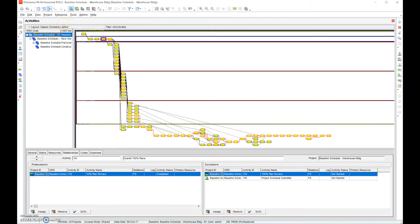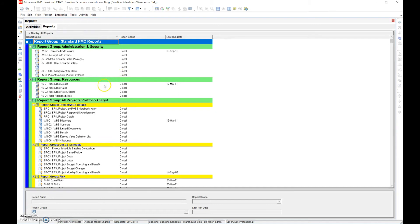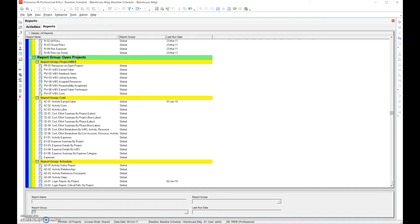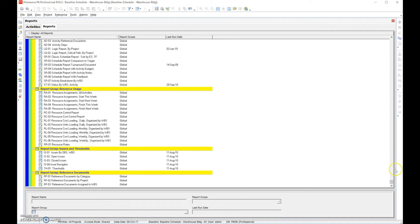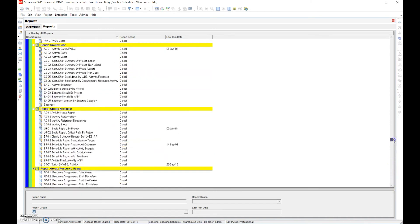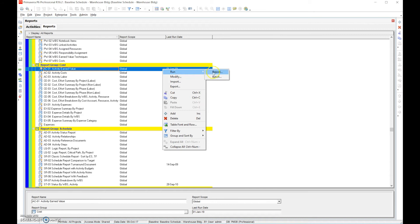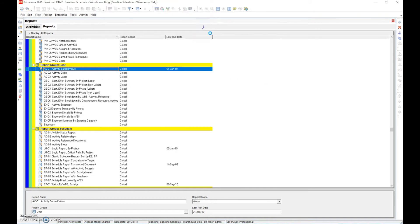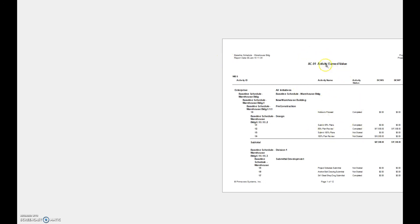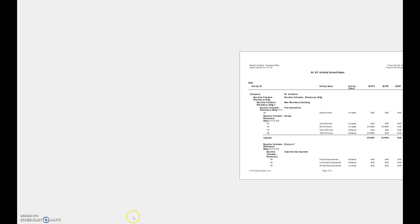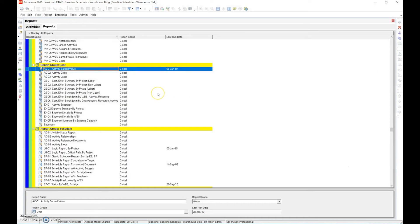We can also do the earned value reports. Go to Tools, then Reports, then Cost, and look for the earned value report — specifically the activity earned value. Right-click and run it, then print preview it. You can see this report is quite lengthy; it goes through all the costs by WBS or however you have it set up. The earned value reports are important because we have a cost-loaded schedule.